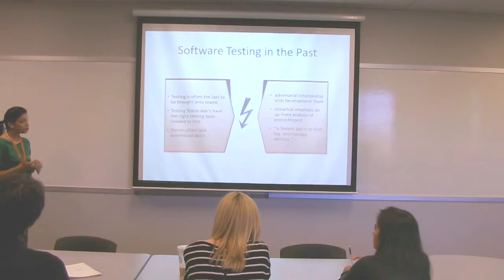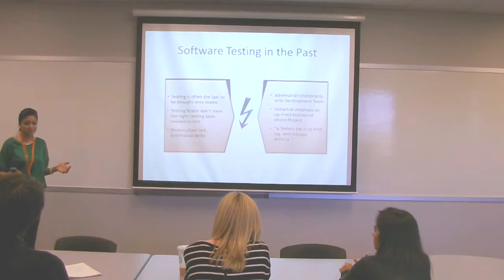Then the tool that we use for our agile management can help us. If we have stories and testing tasks and development tasks, everything in one place, we could easily see if development tasks say done and the estimated hours along the development tasks are 0.